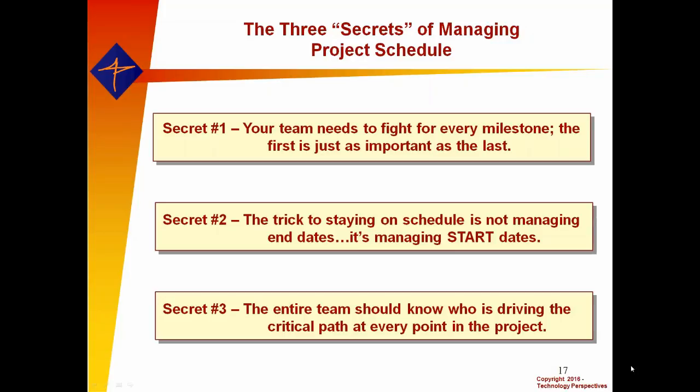If I slip that first milestone, I'm going to fight like heck to get back on schedule by the very next milestone. If you want an analogy here, the analogy would be takt time. So among the many things that takt time helps us with, you can start the month in production on a production line, and within a few hours you know whether you're hitting your pace or not. And if you're not hitting your pace, what do